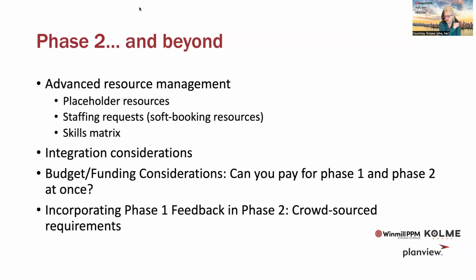One thing I've noticed too, Drew, for integrations in phase one, even when they're pretty well planned for, they don't tend to happen. I would say maybe 10% of all planned phase one integrations have ever really come to fruition. And the reason for that, in my experience, is the fact that they're implementing the very system that would allow them to plan for said integrations. So the ability to plan and really truly understand the requirements takes a little bit of time in the system that you're implementing.